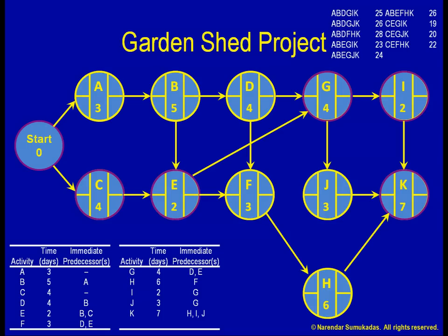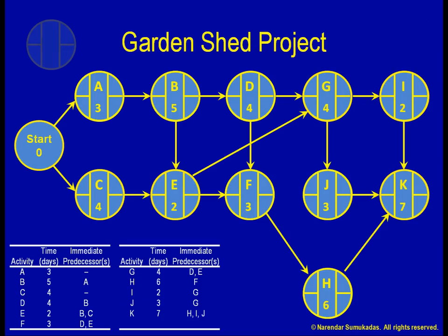Tracing every single path from beginning to end is fine for a small project, but can you imagine how many possible paths there will be for a larger project? There is a more methodical procedure available. In the four boxes for each activity, we are going to fill in some numbers. The first number is the Early Start Date (ES) — the earliest date by which the activity can possibly start. The second number is the Early Finish Date (EF) — the earliest date by which the activity can possibly finish.